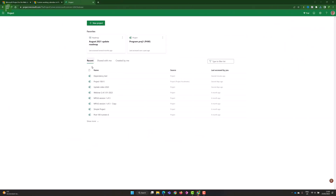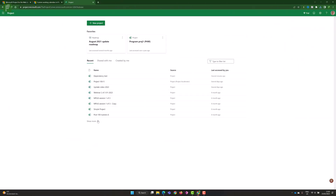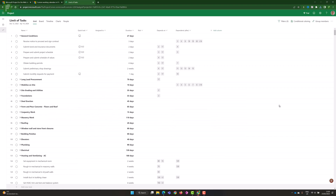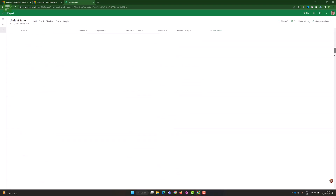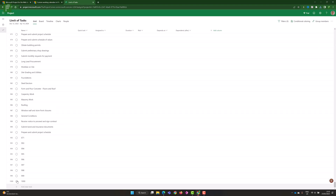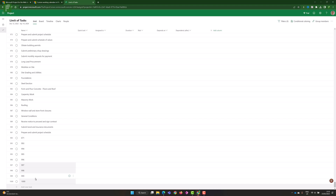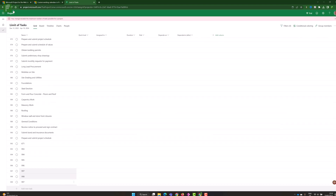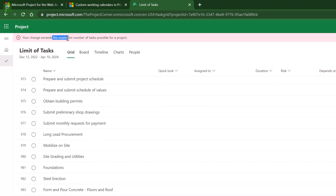An additional update — let me find that project. Limit of tasks: just to see how many tasks I can have in my schedule currently. If I go way down, I have task number 1,000. If I wanted to add an additional task, I wouldn't be able to. I could copy them and try to add those, and you'll be prompted that you exceeded the maximum number of tasks possible in a project. So we now have 1,000 tasks available.